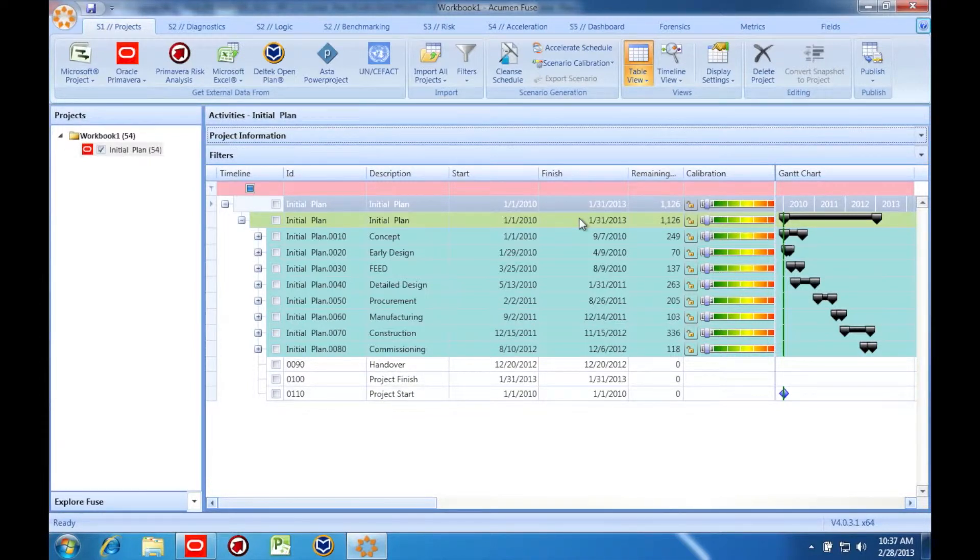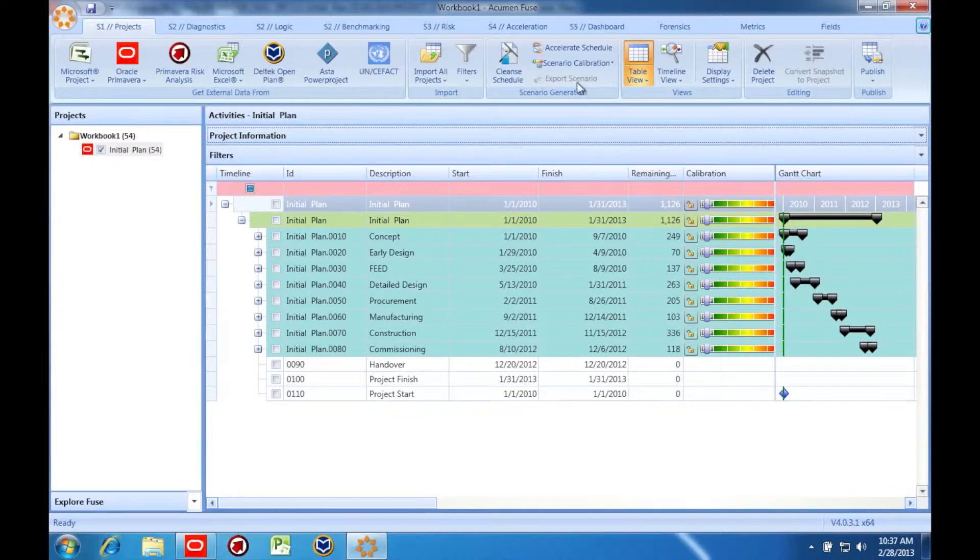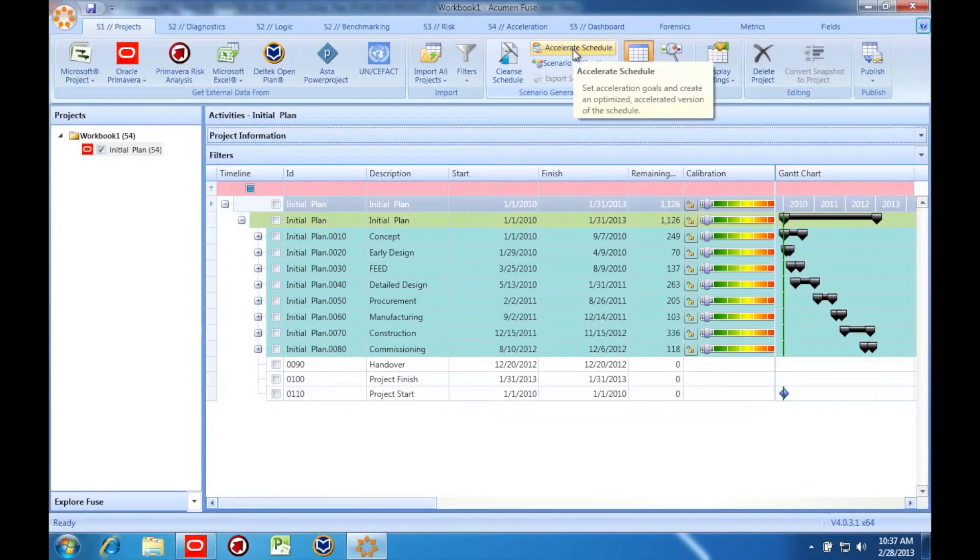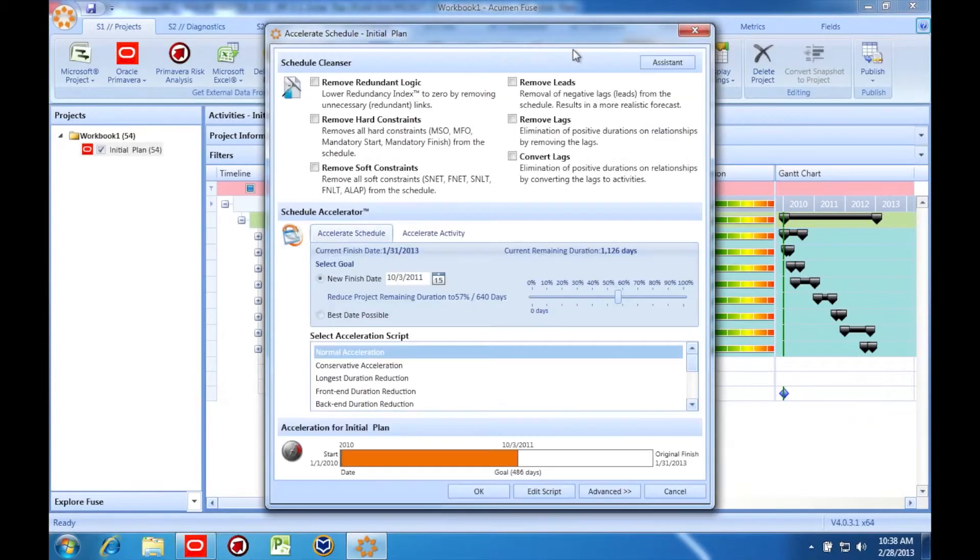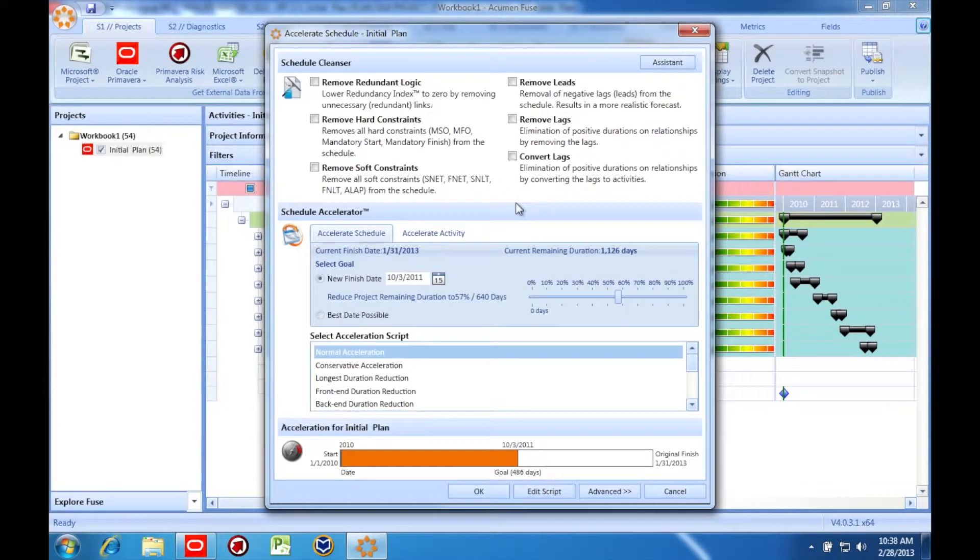With Acumen 360, the schedule accelerator can be used on the current schedule. The accelerator allows the user to select a target finish date and an acceleration script to employ. The accelerator will use the script to expedite the schedule and ultimately determine if the contractual finish date can be met.